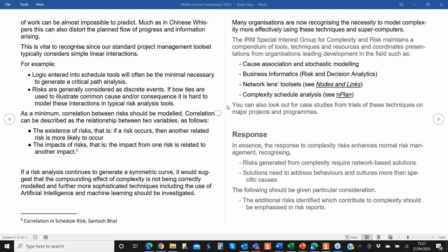Sorry, it's Rob. Just what you said about accountability was just defining the owners of not just the risk, but of the mitigations as well. That's one of the biggest problems, I find. Getting the right person to take ownership of the mitigation in addition to the owner of the risk.